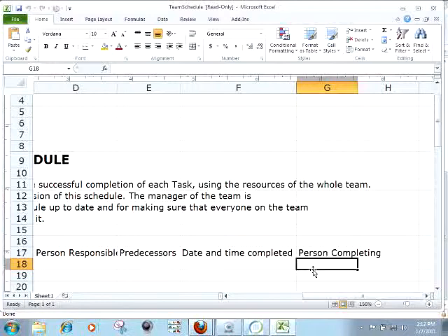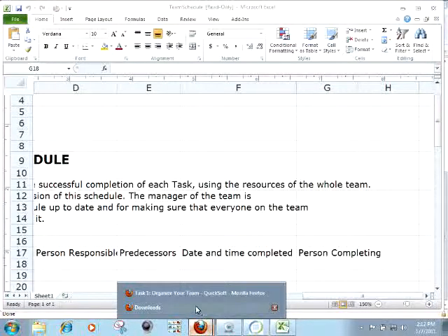So they have to say, okay, that means I have to have a draft copy to my team 3 days prior, and my team has to give me feedback 2 days prior so that I can incorporate their feedback 1 day prior and then have it due when Elaine wants it. So they have to think back through that. So this schedule, they have to fill it out. I just give them a blank one. That's only one of the deliverables this week.